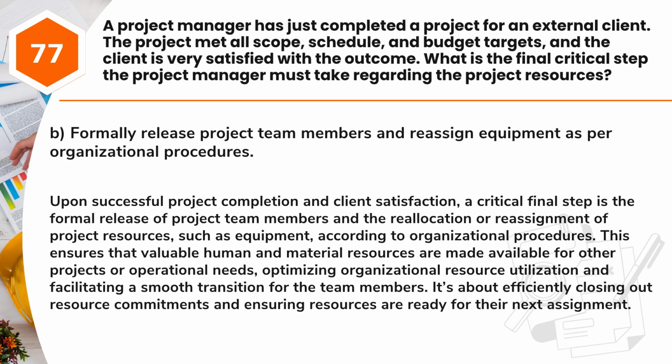Answer: B. Formally release project team members and reassign equipment as per organizational procedures. Upon successful project completion and client satisfaction, a critical final step is the formal release of project team members and the reallocation or reassignment of project resources, such as equipment, according to organizational procedures. This ensures that valuable human and material resources are made available for other projects or operational needs, optimizing organizational resource utilization and facilitating a smooth transition for the team members. It's about efficiently closing out resource commitments and ensuring resources are ready for their next assignment.